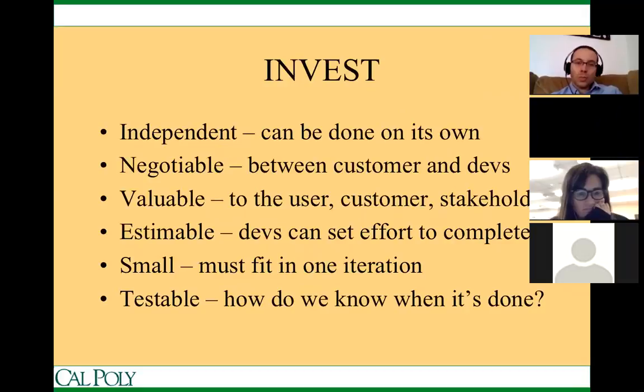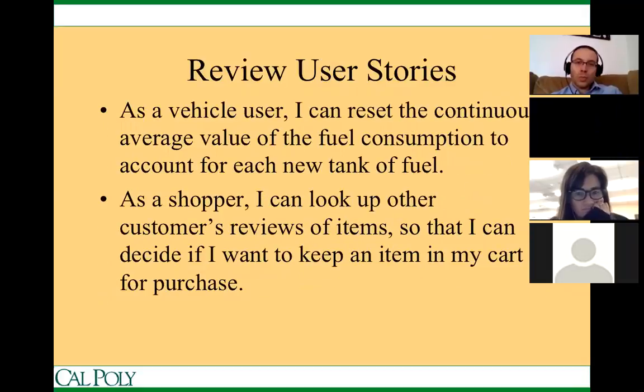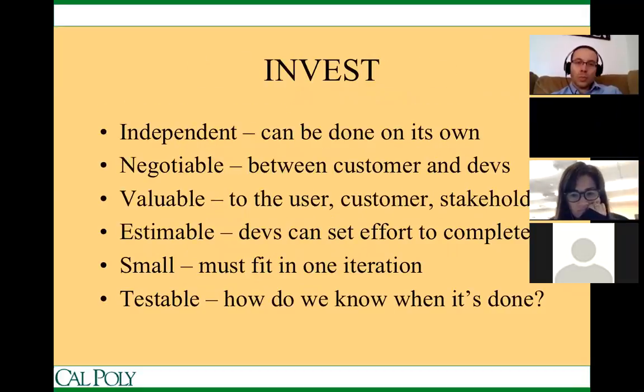Remember, as we talked about, especially on user stories, which we'll look at in a second, this acronym INVEST, and we can also use this on functional and even non-functional requirements. Are each of these things independent? They can be done separate from the other use cases. Are they negotiable, meaning that we can negotiate the scope of this and how long it is going to take?